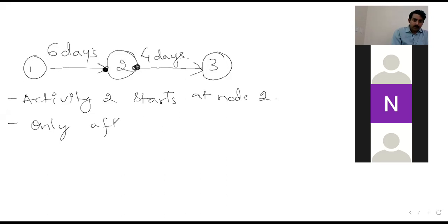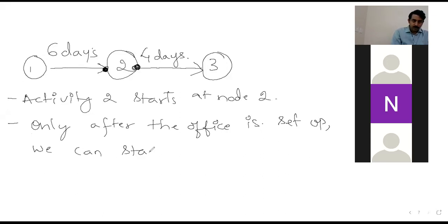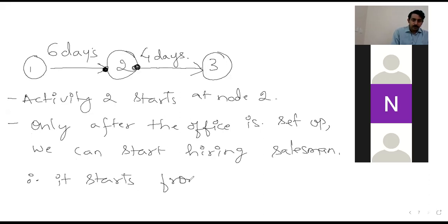Only after the office is set up, we can start hiring the salesman. Therefore, this activity starts from node 2.